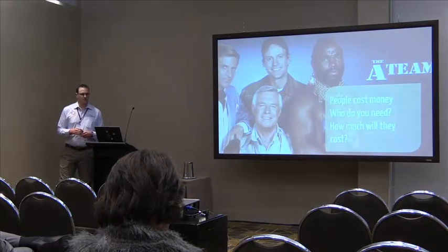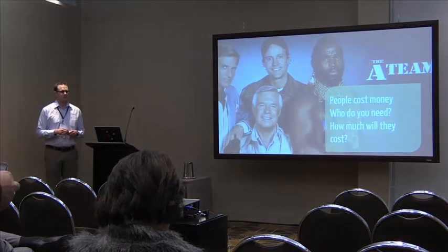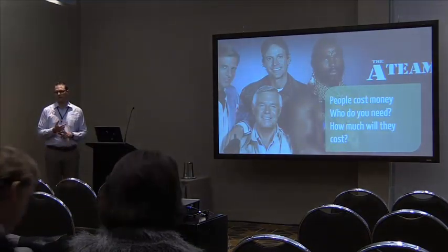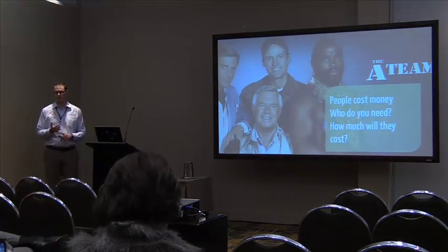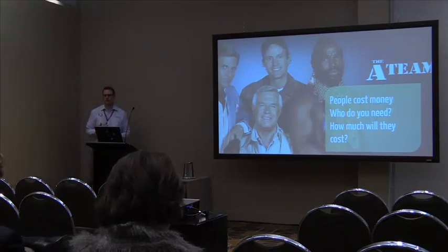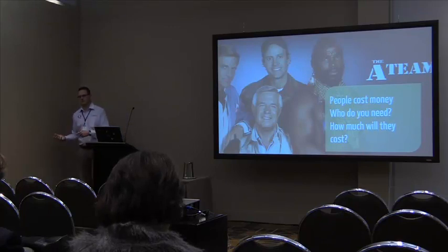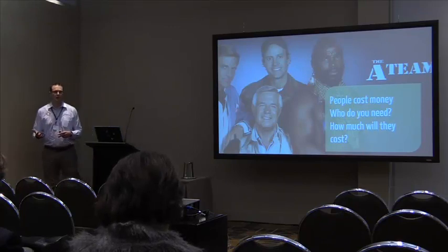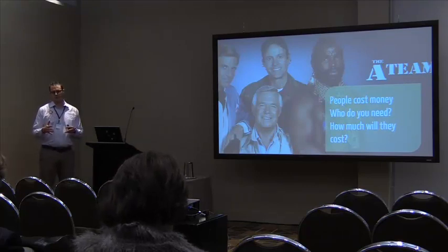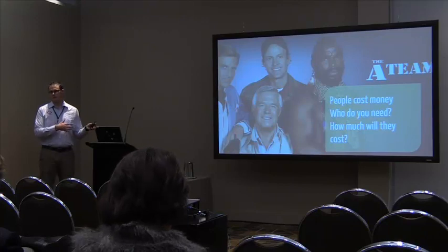One of the other major costs is also around people. In some ways you're going to need some consultants to do the work. That's going to be a cost. During a project you may have some key internal people who move on, so then you have to bring in additional resources, an additional cost you may have to think about. And by bringing people into the project, you've got to keep the business going, so there's a backfill cost.